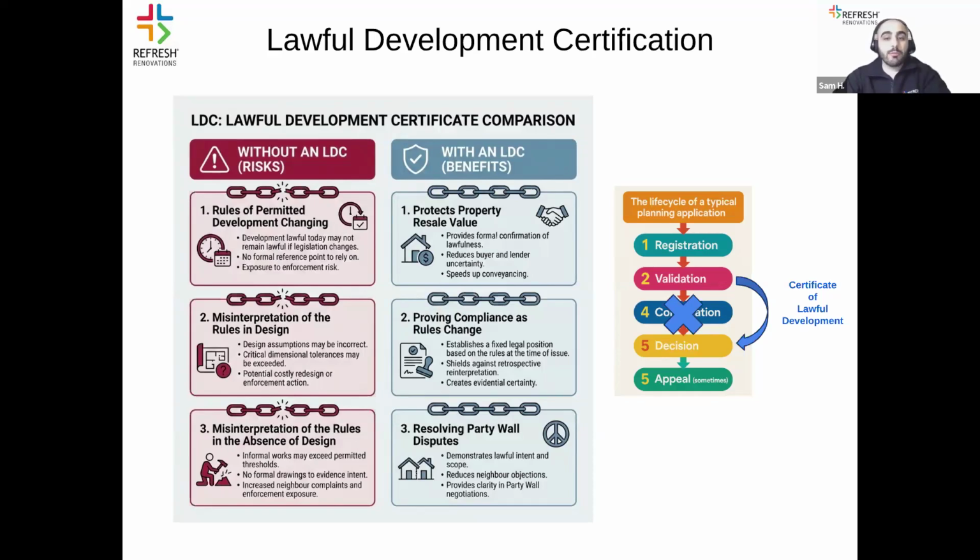I would say this has to do with risk tolerance, because without a lawful development certificate, you'd be running the risk of non-compliance with the PD rules, such as the misinterpretation of the rules by the architect or designer that could push the design proposal too far. 2, it could be the absence of compliant design input and council verification, which would mean effectively relying solely on the competence of the contractor or builder to correctly interpret the rules in implementation as they build the project. And 3rd would be that the rules of permitted development could change down the line.